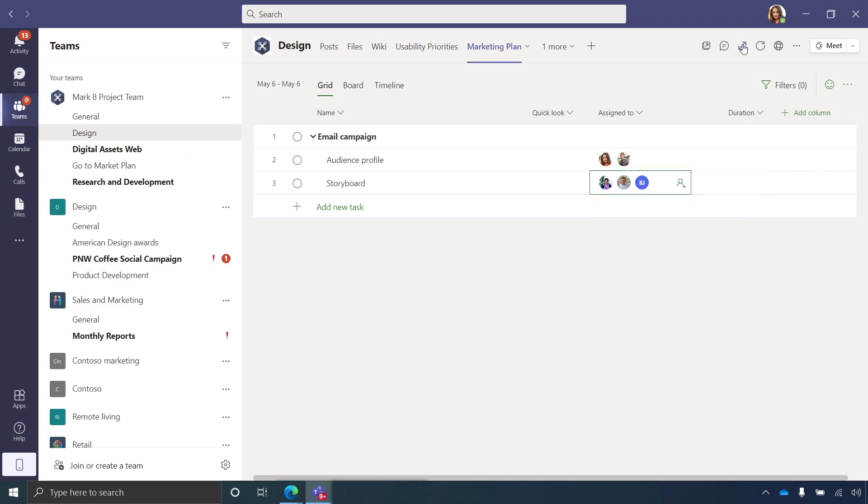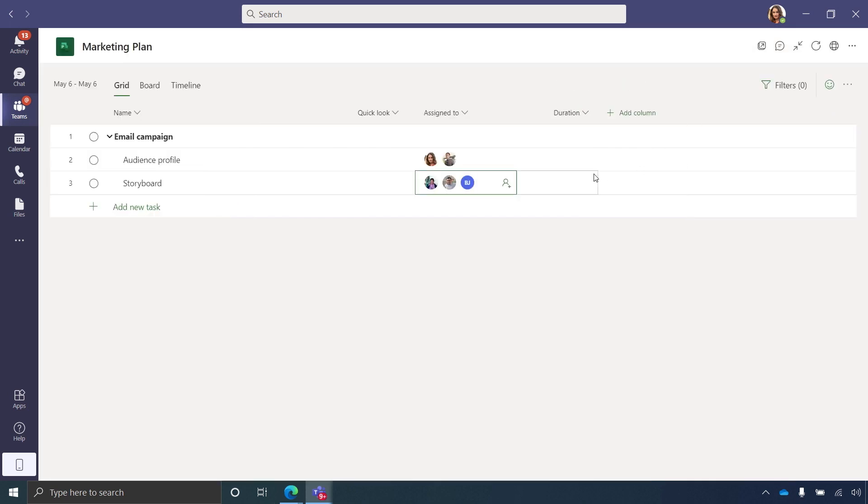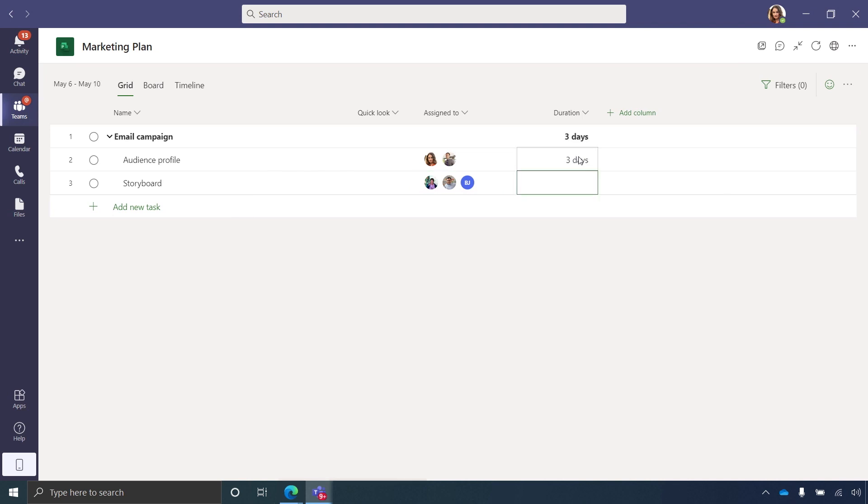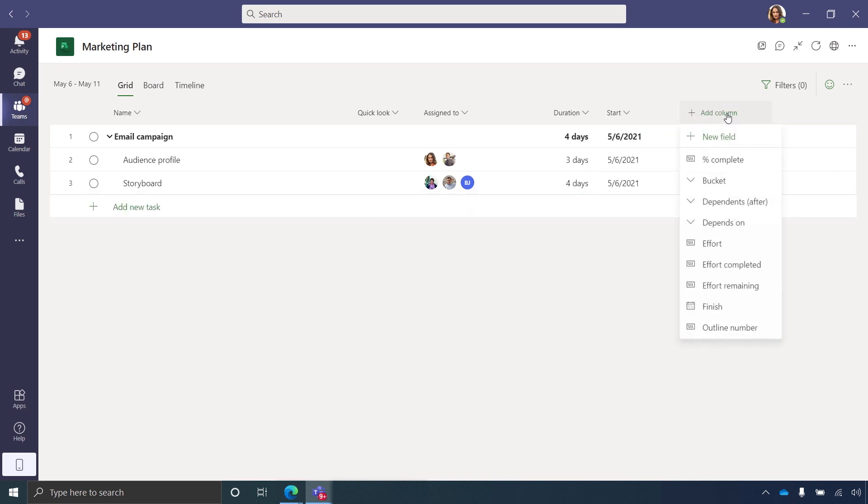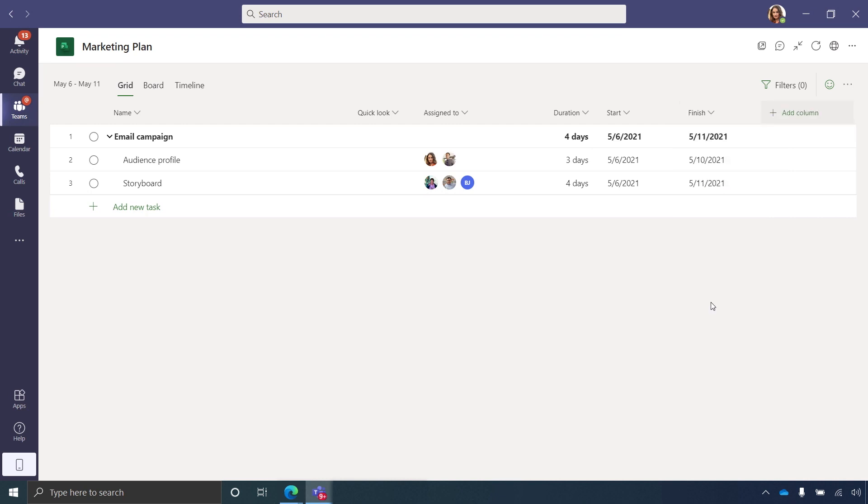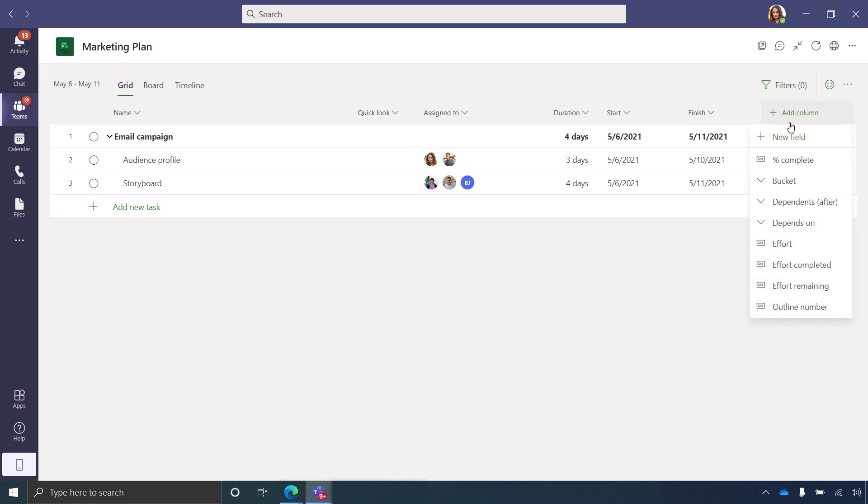Now I have everyone in and I can lay out the project schedule. You'll notice there's a duration column here by default. I'll assign each task the number of days required. I'll add start and finish date columns. You can see the project uses today's date as the default start date. Then behind the scenes,